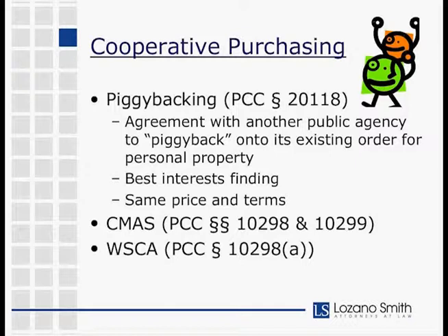And in those cases, the district probably wants to make a specific finding if it's going to try to still go forward. But there's probably going to be risk there. If it's over 50%, then it's most likely not going to be incidental, which is pretty common sense. And the district should treat it as a construction contract.